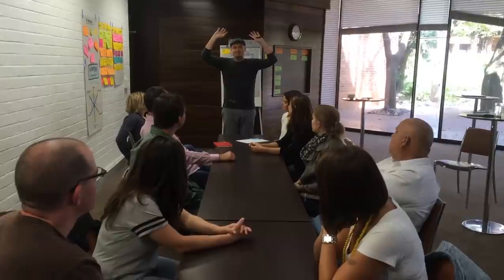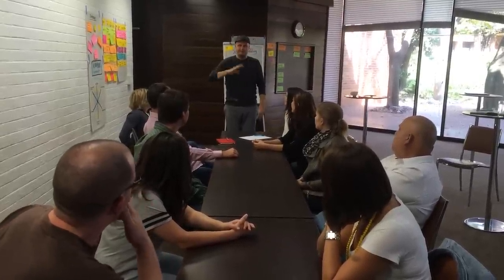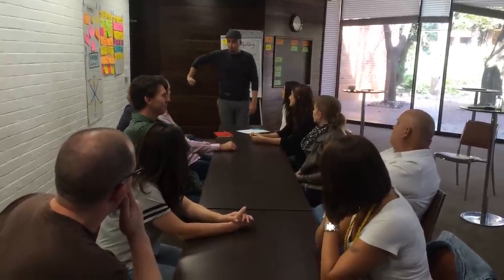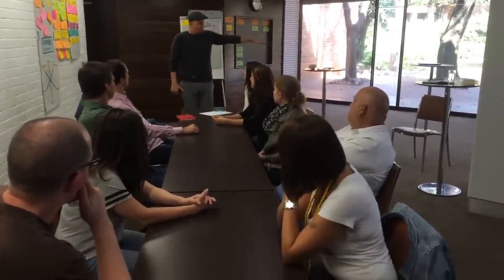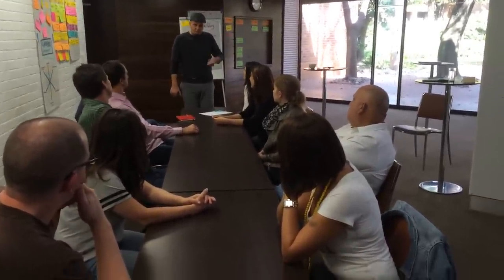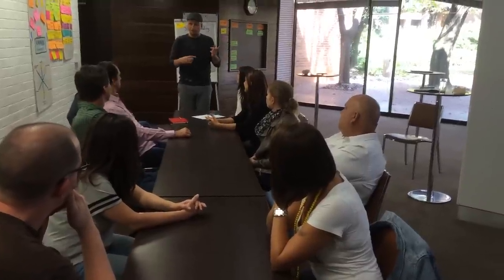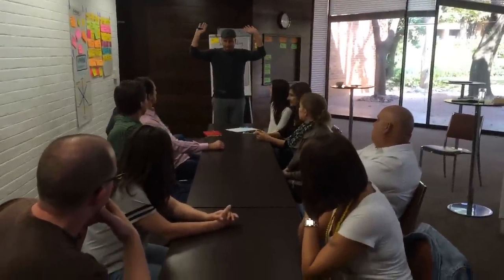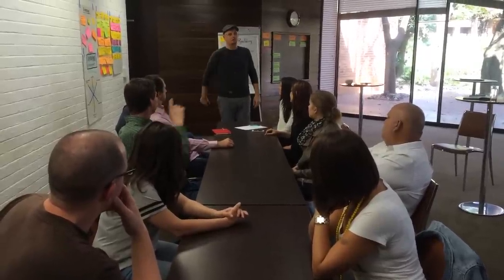In the beginning, really put the hands in the air, because the switch from push to pull is not that easy. You wait until the ship gets pulled out of your working area. And if there's nothing in your working area, you can go to your neighbor and pull in new work, if there is work available. That's pull. So, do your thing, hands in the air, and wait. Only if there's nothing in there, pull from your upstream neighbor.